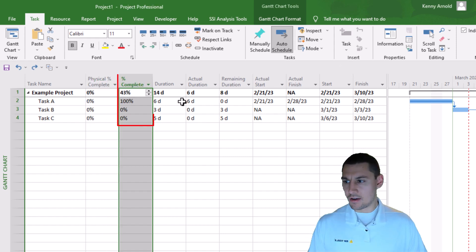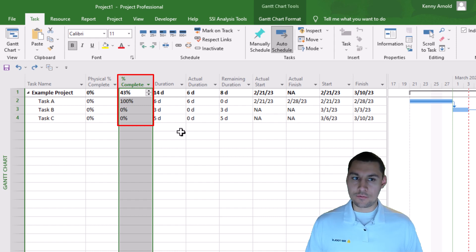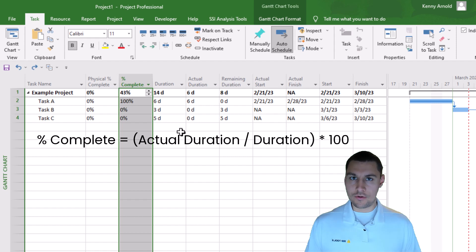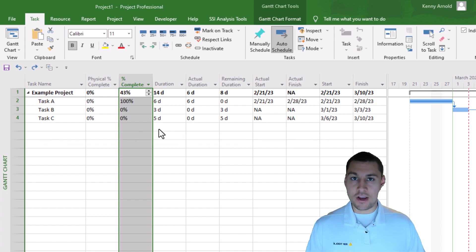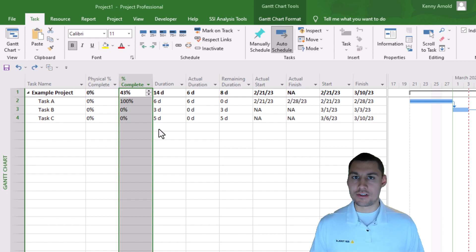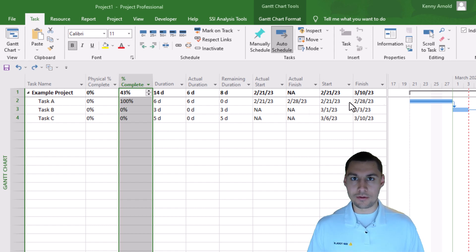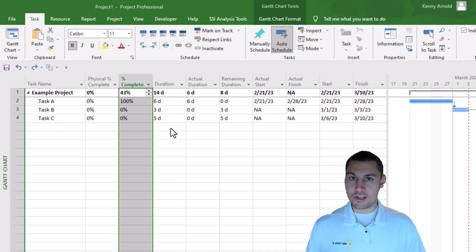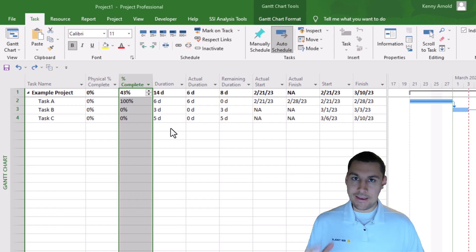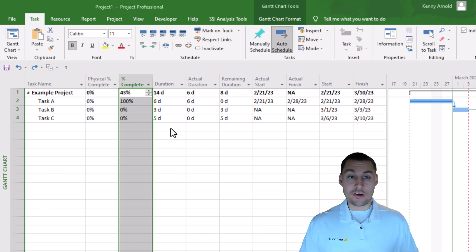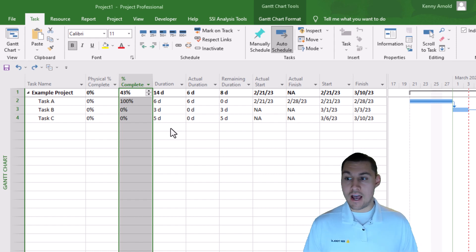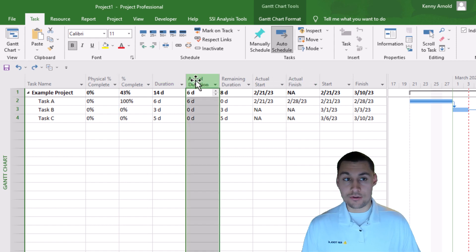Let's talk about what the difference between these two fields even is and why Microsoft Project gives us both of them. The percent complete field represents the percentage of the task's total duration that has actually passed since the task started. So it's completely based on duration and nothing else — nothing else factors into that calculation. That's why oftentimes you may hear people refer to this field as the duration-based percent complete. What's most important to understand is that if a value is entered into it, other fields on the same task are going to be affected, and vice versa.